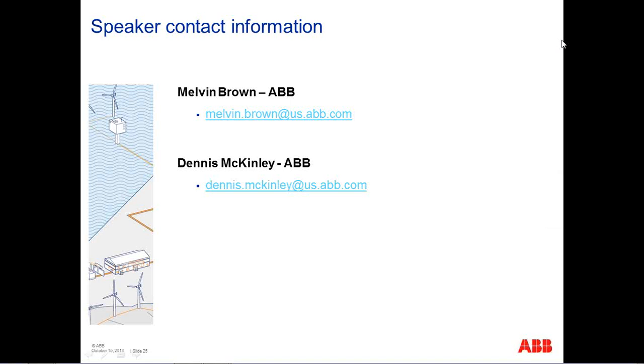The projects that we typically have issues with are the projects where we don't have time to do the proper optimization of the system that we would need to, and therefore we haven't considered all the different alternatives. We wind up having an issue where, for example, the collection system may be undersized, or the substation has not taken into consideration the fact that there's a future expansion possibility.